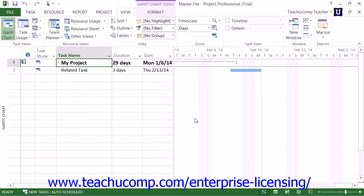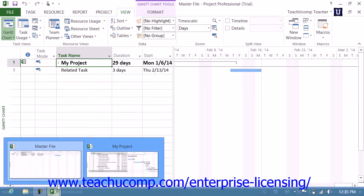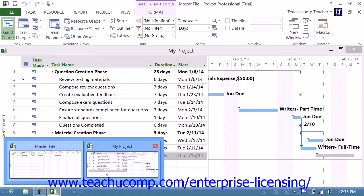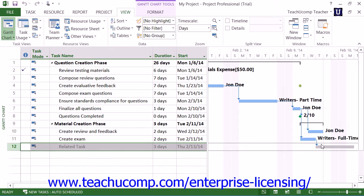Also, if you open the original individual project files that are linked into the master project file, you'll see gray ghost tasks for the linked tasks between the project files. These are simply gray task bars that appear to indicate that the task shares a dependency with another task in a separate project file.